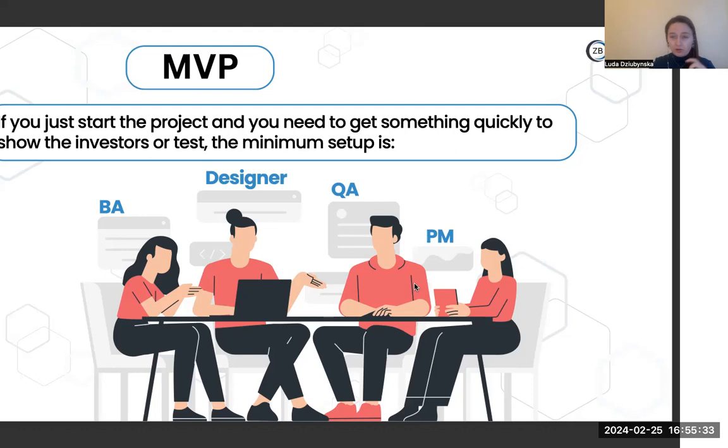In our case, our statistics show that PM and QA time is usually from 10 to 30% of development time. And when we calculate, we usually take 15%. So as you see, it's a percentage of development time, so it depends. If you have, I don't know, 4 people, in most cases I think it will be a full-time or maybe 6-hours-per-day person. But if it's 2 people, for example for an MVP, it's usually from 1-2 hours per day, maybe less.